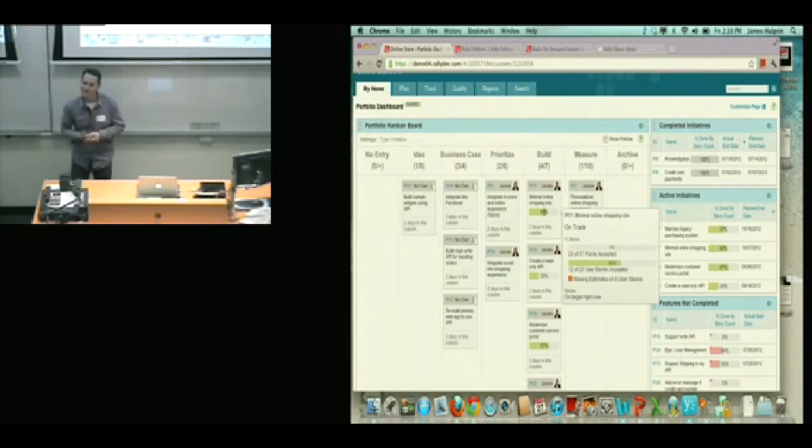So you can still technically run a backlog with one iteration and just be pulling things from the backlog into your only iteration, and then that measurement, that progression, you can calibrate depending on how many iterations you want, basically. Absolutely. Yeah. So all stories that are pulled into that tree will basically roll up for you.